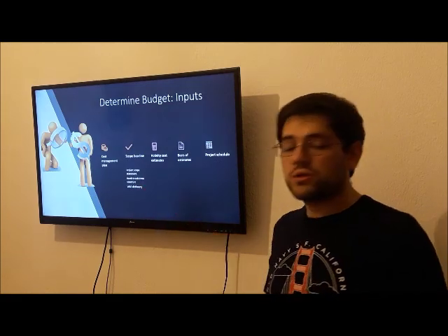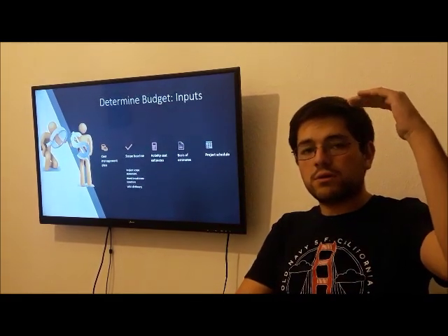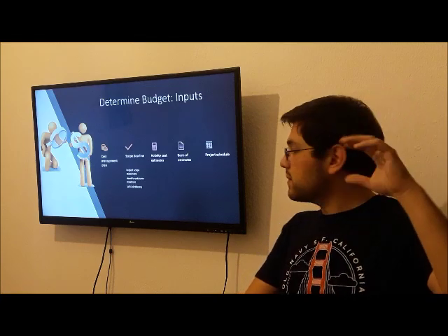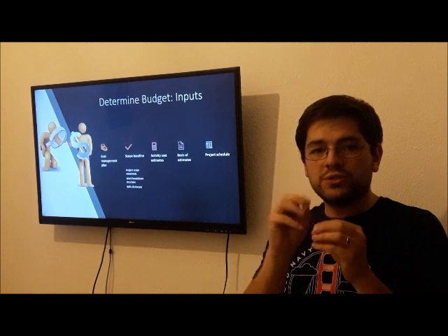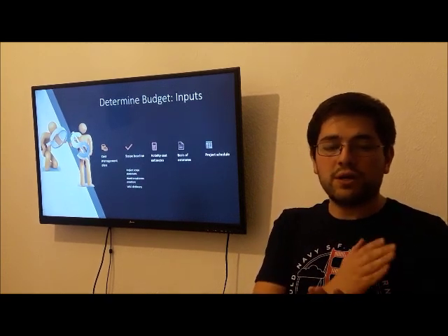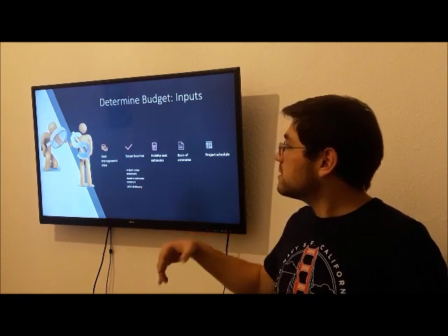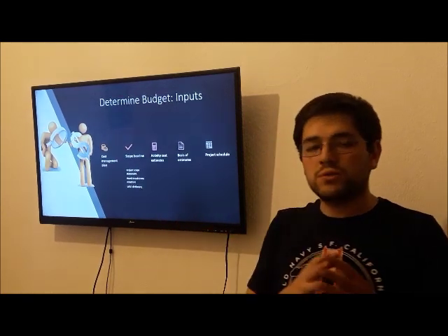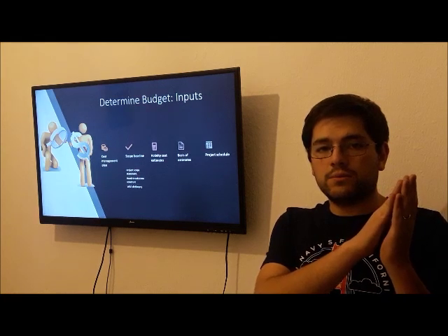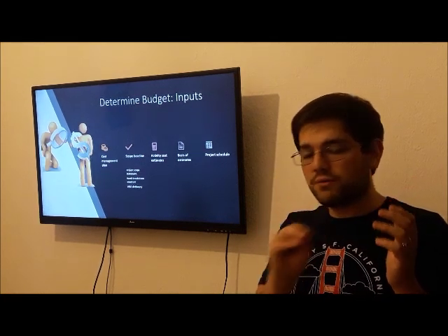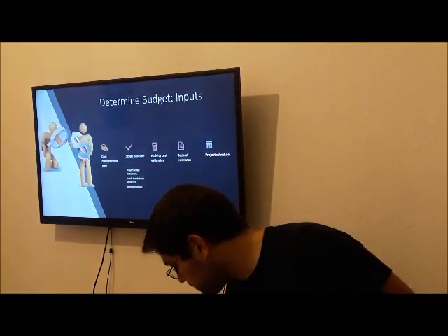The work breakdown structure and the dictionary is basically all the activities that are done in the project and breaking down to small steps that we will have to follow in order to complete the project. We use this as an input because, like I mentioned before, we see how much we're spending in every activity to calculate the whole budget.